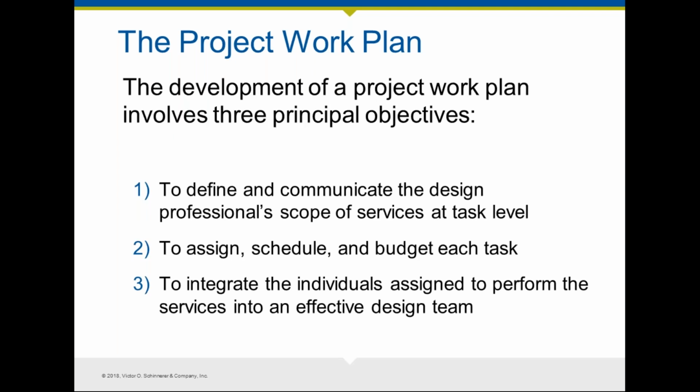So you want to be able to define and communicate the design professional scope of services as a task schedule. You want to assign it to a particular resource or a person, schedule it and budget each task, and make sure that the individuals are indeed integrated so that there's coordination between the members of the design team to get this thing done.